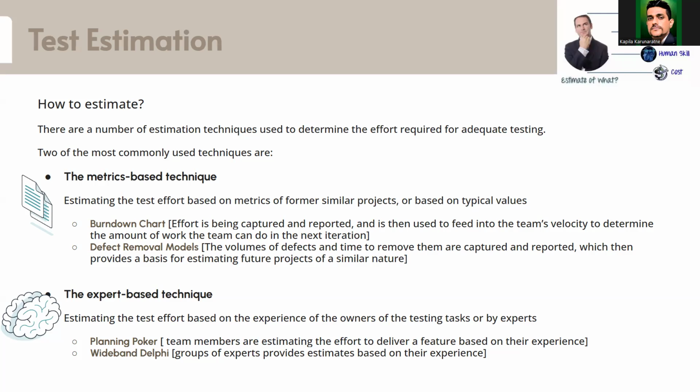They will have a large amount of data stored, and based on that they can derive some metrics. They can say that if it is this many stories and this type of building, they need this much concrete, this much sand, this much cement, and there will be very identified numbers based on their history and data.